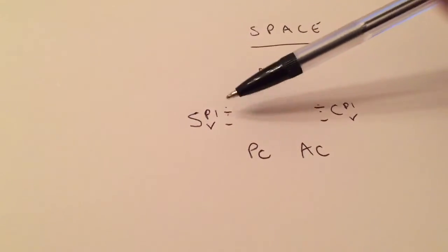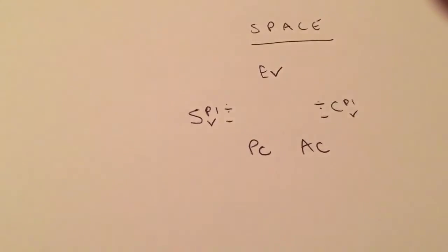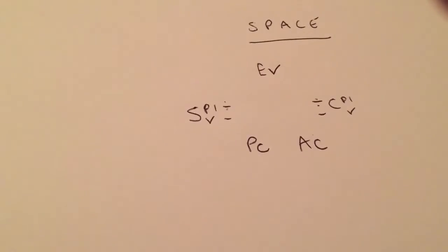So to work out SPI, it's simply earn value divided by planned cost. CPI, earn value divided by actual cost.